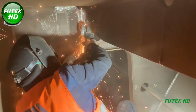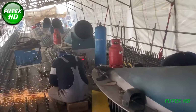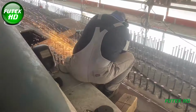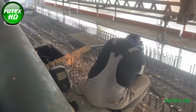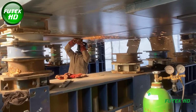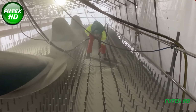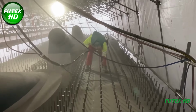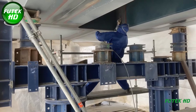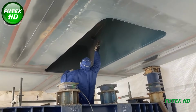The early stages included the creation of auxiliary supports on the Weißach side, which were essential for stabilizing the structure during initial phases. By the end of October 2020, these supports were ready, enabling the next stages in the steel construction process. In November 2020, prefabricated steel components began arriving at the site from production plants in the Czech Republic, Hungary, and Austria. The philosophy behind the project was to fabricate the largest possible segments off-site, reducing the need for numerous transports to 66 specialized deliveries. Some components weighed up to 90 tons, necessitating careful logistics and coordination.